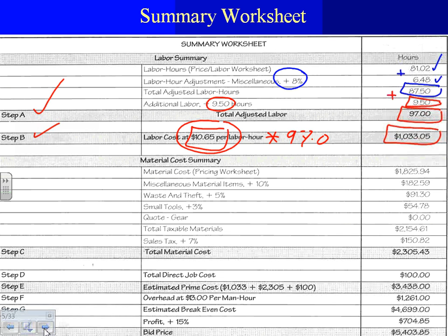Because if I have 2 apprentices and a journeyman, the journeyman is paid $33 and the apprentice is paid $15 an hour. So which dollar per hour are you going to use, the $33 or the $15? They average them. That's the shop average. You average the dollar rates of your crew. So for the 3 of them, 2 apprentices at $15 is $30, plus $33, that's $63, divided by 3, which is 21. That will be the shop average. We'll talk about this one in a second.